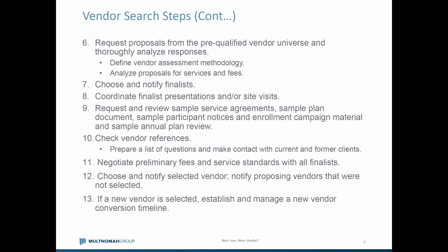but it's important that those get read and that there's a standard methodology to assess each proposal and make sure that each vendor is evaluated on a consistent basis, both for the service aspects as well as for the pricing aspects, as we talked about. Once the analysis has been done, the committee should meet and evaluate those. And based on that evaluation, select finalists that they want to interview in person.